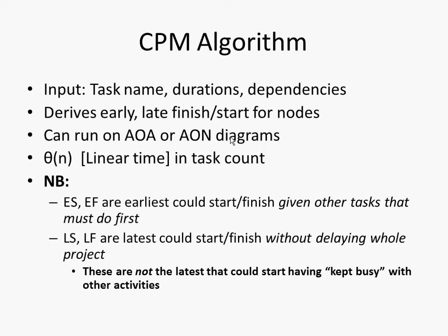Late start and late finish: the latest you could finish or start this activity without delaying the whole project. Let me repeat that, and forgive me, but students can get these wrong. Late start and late finish are the latest you can start or finish without delaying the entire project. And I want to emphasize, these are not the latest you could start or finish and still be kept busy with other activities. It's without delaying the project.